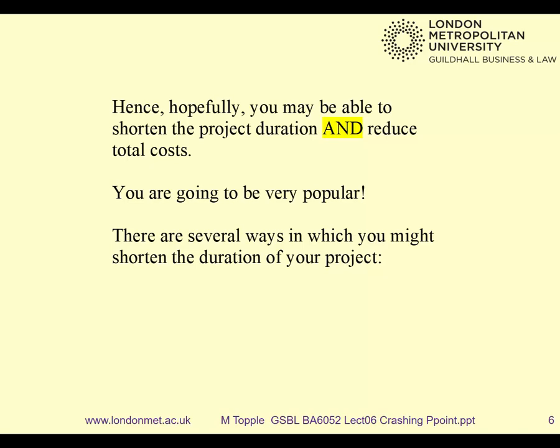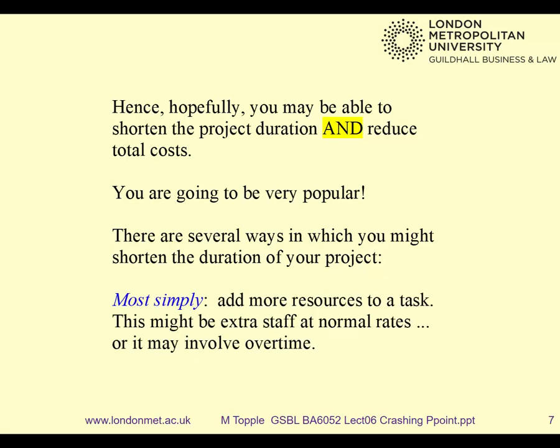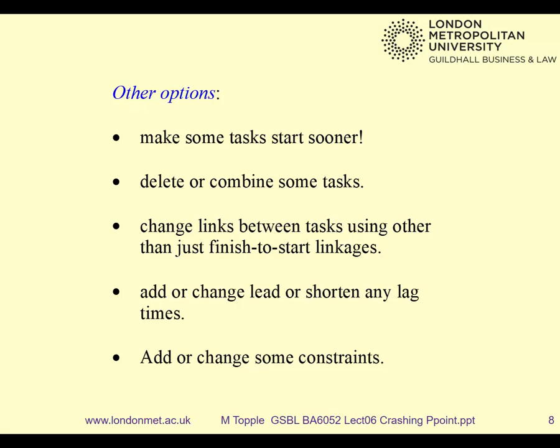Now, there are several ways in which you can shorten your project. First of all, of course, add more resources if you've got them. Use effort-driven scheduling. If one person can do it in 4 days, 2 people can do it in 2 days. If that's feasible, you can do it. It doesn't cost a penny. So that's the easiest thing to do. There are other options that you might try. I've listed some of them here, and these are all free as well.